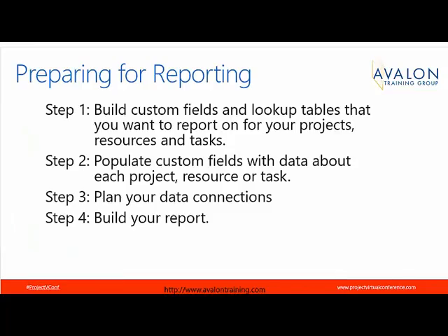Of course, building these reports does take some planning. A lot of my examples today relied on custom fields. So custom fields, whether it was summarizing my projects by who was the sponsor, what was the project funding, those are all custom fields that I built into my database, populated all my projects with the appropriate metadata, then plan my connections to include those custom fields, and then build my report.